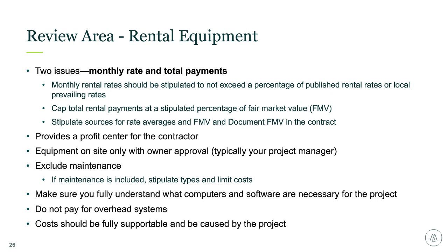Or something that's indirect in nature could easily be classified as overhead and profit, which is typically within the cost of work definitions. And again, ask for detail. All costs should be fully supported and caused directly by your project. If it's an indirect piece of equipment, then it should really be covered within corporate overhead and fee.